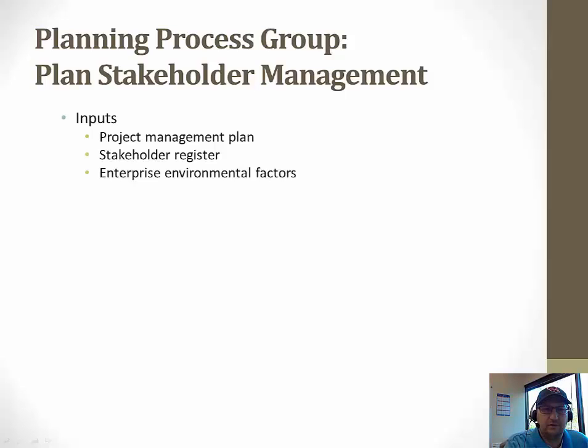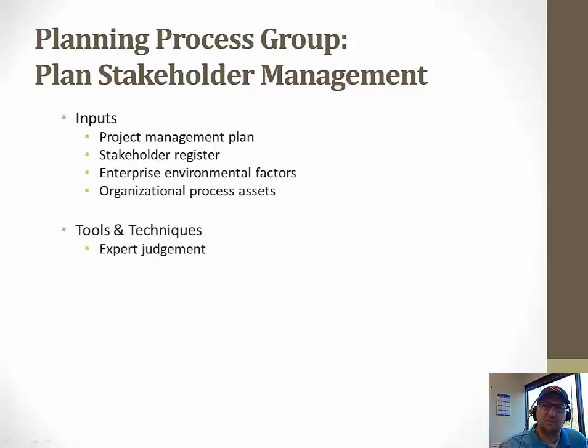One of the keys to understanding why this process is important is as the project progresses, the membership of the stakeholder community may change, right? So, but also the required level of engagement of individual stakeholders may change throughout the course of a project. So that's a key point in understanding this. So therefore, then, stakeholder management planning is an iterative process, as we mentioned, and it's reviewed on a regular basis by the project manager.